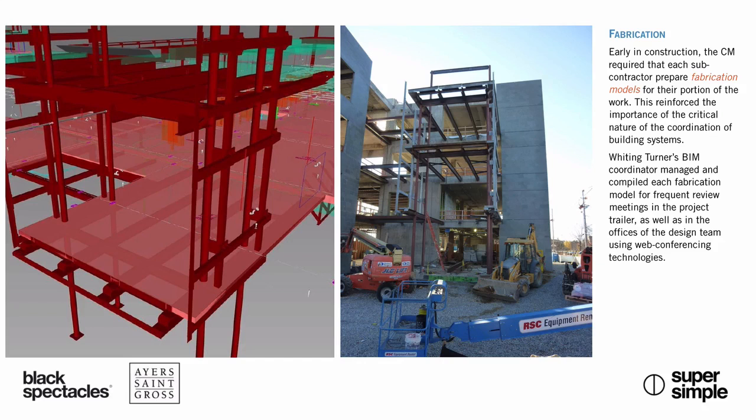So the image on the right there, you can see the install progress of the steel frame that kind of hangs over the concrete infrastructure or skeleton of the building. So it's a very connected digital workflow that allows things to happen quickly. A lot of things are shop fabricated nowadays and brought on site, almost like a menu that you can order from, and it all gets delivered and bolted together, and voila, you have a building.